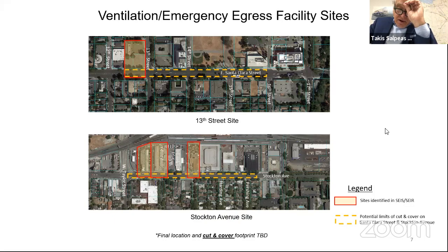And therefore, when the soldier piles are drilled from the top down, I think we can do it within the street without disrupting the sidewalks here and there, depending how linear the 60 feet are on the surface and so on. But definitely, I am telling you today, we are not going to shut down all the cross streets at once. One at a time, and move in segmental type construction.